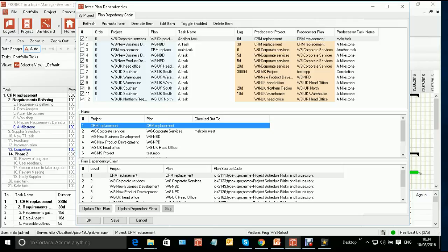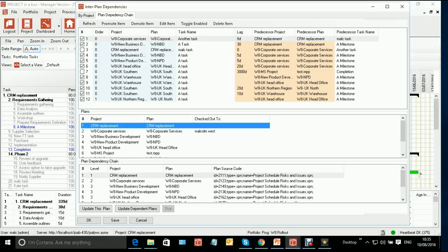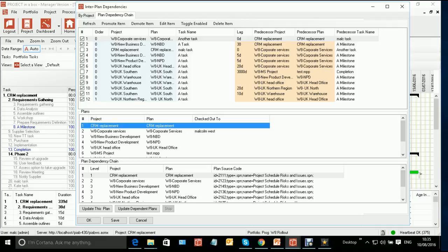So it's very important to know that the plans are actually present and checked in. If people leave their plans checked out and we can see here that this plan is checked out to me, then when I check out and update the first one, then it comes down to the second one. It says, oh, I can't check it out because it's already checked out. And it will give you a message and then stop at that point in the process. And in fact, we can force it to do those things from here.